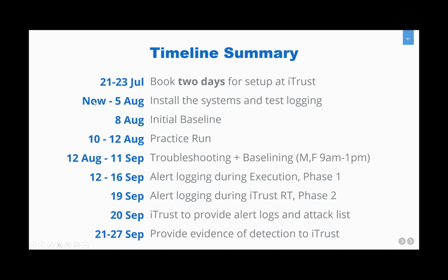Then we expect vendors, all the IDS teams, to come down in the next 2 weeks to install their systems and test if logging works correctly. Then on 8th of August, we'll conduct an initial baseline. From 10th to 12th of August, we'll do a practice run. Then for the next month, we'll troubleshoot and conduct regular baselining. Then we'll have the actual exercise execution in September.